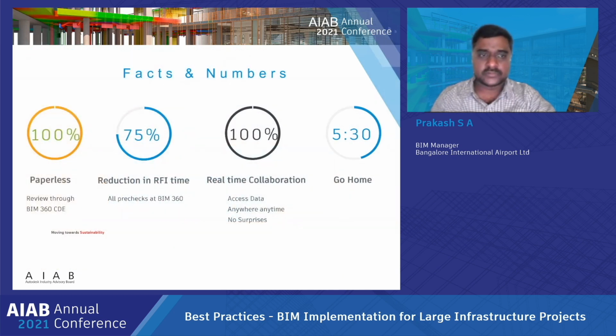However, we can see another benefit of the cloud services. Again, 100% paperless: all the reviews and all the submissions are in BIM 360. Once the contractor submits and we review in BIM 360, we give the comments, and once published, we can assign those comments particularly to the persons or department.